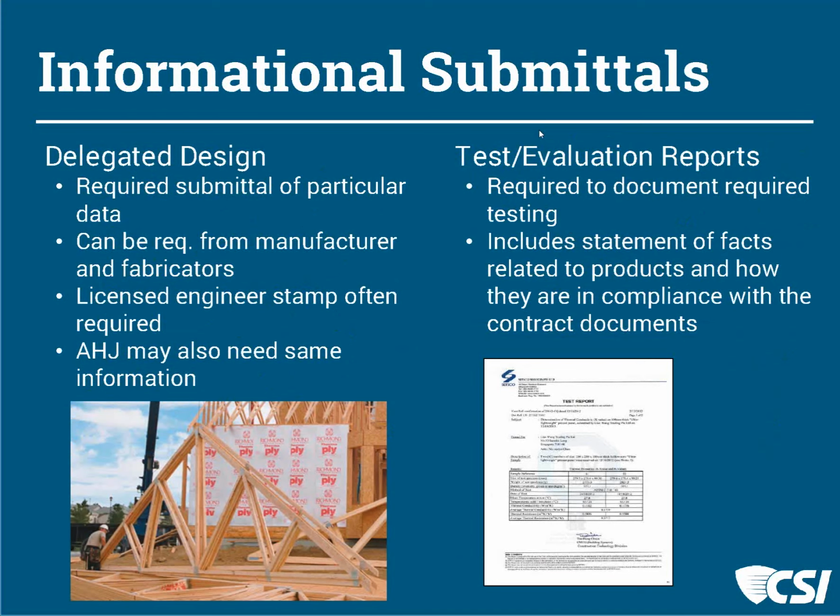So we want some information in the file saying, well, a licensed engineer has looked at this and signed off on the design, and it meets the criteria that we specified. And oftentimes the authorities having jurisdiction will want to have this documentation within the records of the project in case anything happened. Then they've got those engineers' information that actually engineered the products.